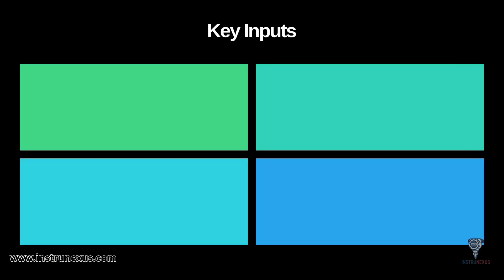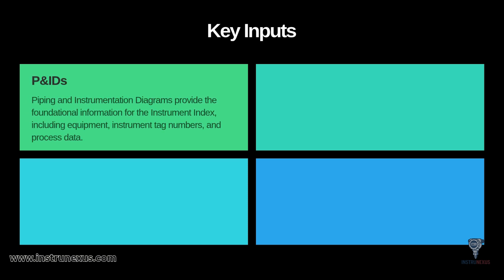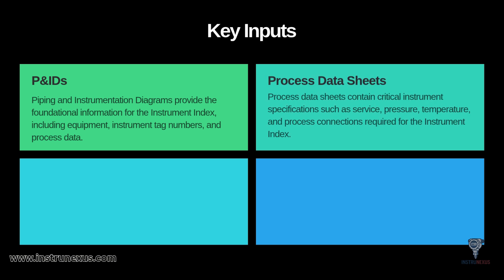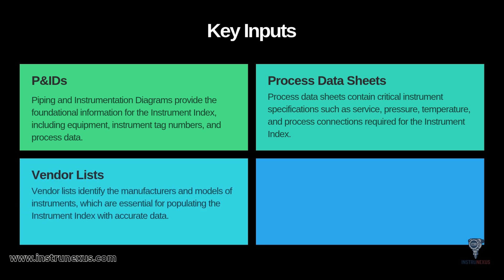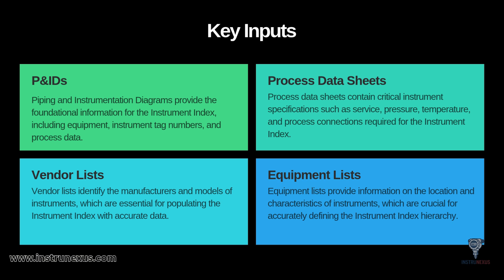You can't create an Instrument Index from thin air — its accuracy depends entirely on the quality of its key inputs. First and foremost are the P&IDs, which provide the foundational information including all the equipment, instrument tag numbers, and process data. Next, you need the process data sheets, which contain critical specifications like the service, operating pressures, temperatures, and process connection details. You'll also pull from vendor lists, which identify the approved manufacturers and models for the instruments, and from equipment lists, which provide information on the location and characteristics of the instruments.